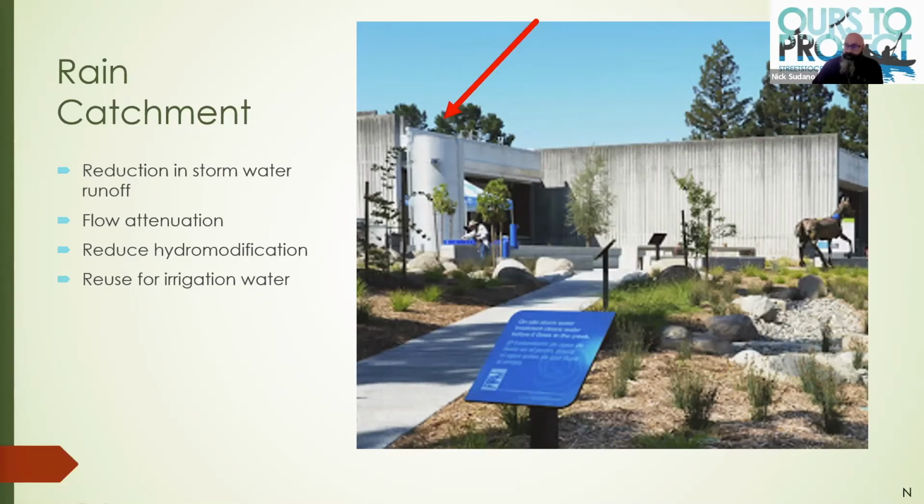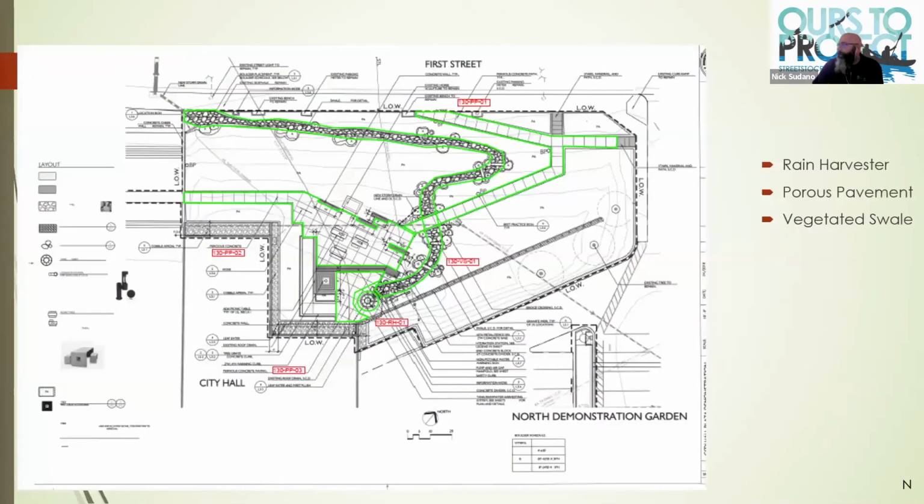Obviously when we're inspecting these, we're making sure that these do hold water. We'd want to see water come out of this high flow bypass up here the way it was designed. I do think that some of these have a bypass valve. We just want to make sure it's not in the open position. I'm not going to go through this, but this is just showing a design drawing of how that's used in sequence with the treatment train.